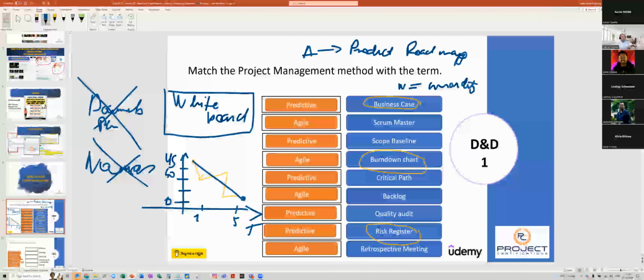But the reason we do that is that if we're making changes, that will deliver more value to the customer, to the business. So that's the real justification. Whereas in waterfall, a change is a disaster because that will impact your baselines, and if it's impacting the baselines, there is some deviation, either in the scope, the schedule, or the cost. Okay? Makes sense. Thank you. Excellent.